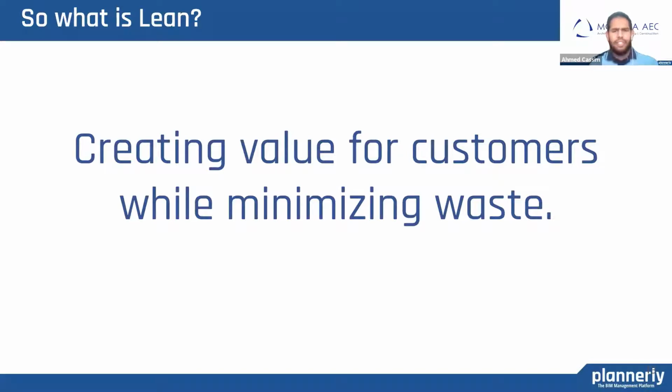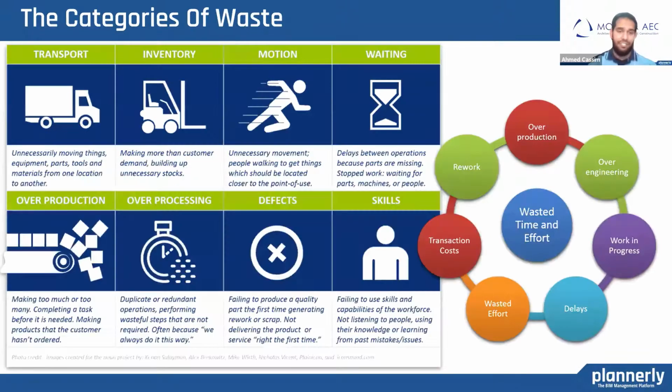Rather than redesigning all the time, it's intelligently planned design with less waste, understanding what the client needs and giving just that. There are many categories of waste. There's transport, inventory, motion, delays, when things aren't located closer to the point of use, overproduction of products the client hasn't ordered, overprocessing, etc. There are many delays as well, and rework is the biggest delay in design.